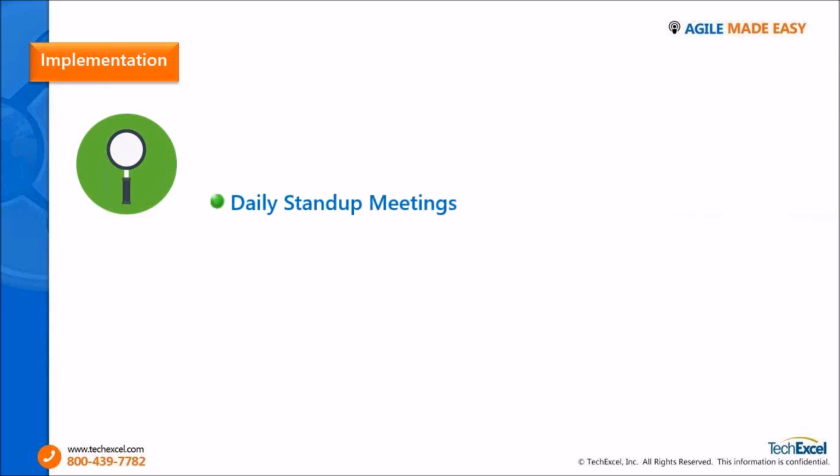So if you see, one part of the communication is the daily stand-up meetings. We have daily stand-up meetings in which both the development team and the QA team participate. It's just a 15 to 20 minute meeting. We look at a large Agile board that we developed, which is part of the DevTrack tool, and we see the set of tasks owned by the developers, the set of tasks owned by the QA team, and also any bugs that have been reported by the QA team.